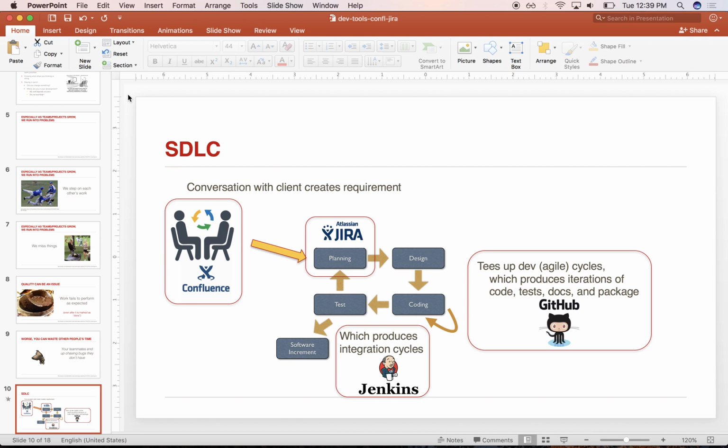But typically it starts off at the beginning of a sprint, or actually earlier than the sprint, when the business analyst, the project manager, or the business owner will meet and look at a large bucket of tasks that are yet to be completed. They'll look this over and see if there are any dependencies amongst the various tasks. They'll try to plan it in a particular sequence, depending on some business strategy, and also in such a way that we can work on something that doesn't depend on something that is not there yet.